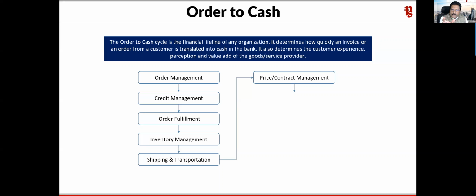In case the escalation or de-escalation is over and above 10%, then whatever the case, for example, the 100 rupee product has now become 85 rupees, because now it is over and above the 10% de-escalation, the supplier needs to supply this material at the prevailing rate, which is 85 rupees.